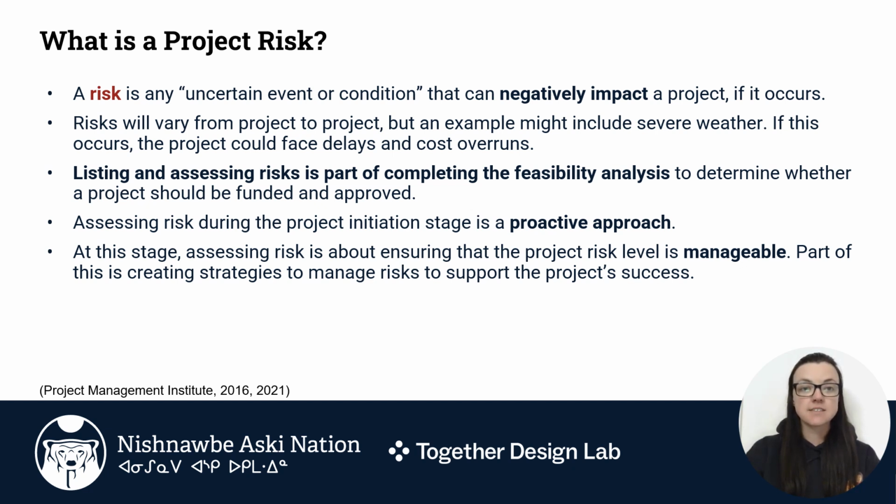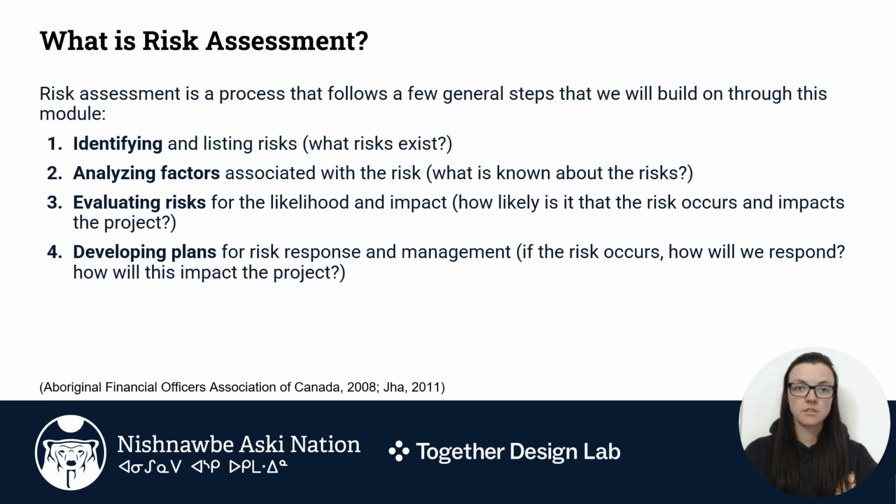Listing and assessing risk is part of completing the feasibility analysis to determine whether a project should be funded and approved. Assessing risk during the project initiation stage is a proactive approach. At this stage, assessing risk is about ensuring that the project risk level is manageable. Part of this is creating strategies to manage the risks to support the project's success.